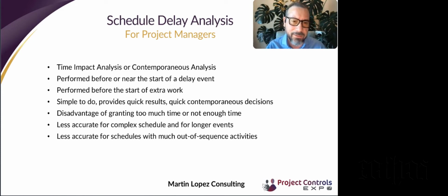One disadvantage is that in doing so, you may grant too much time or not enough time for a particular delay. If you have a complex schedule, a big schedule with thousands of activities and a complicated network, then it can be less accurate because of the many logic relationships in the schedule.